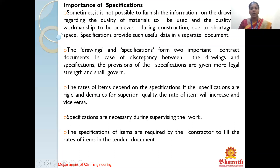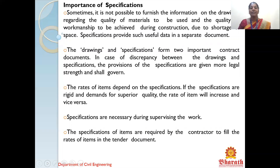In the drawing itself, we cannot describe the quality of a material in very much detail and depth, so we maintain a separate document which can be verified easily and serves clearly for documentation purposes. Drawings and specification form two important contract documents. In case of discrepancy between the drawings and the specification, provisions of the specification are given full legal strength. The rates of items depend on the specification — if specifications are rigid and demand superior quality, the rate of items will increase, and vice versa. During supervising the work, the project manager should carry the specification always so it can be verified easily on site.